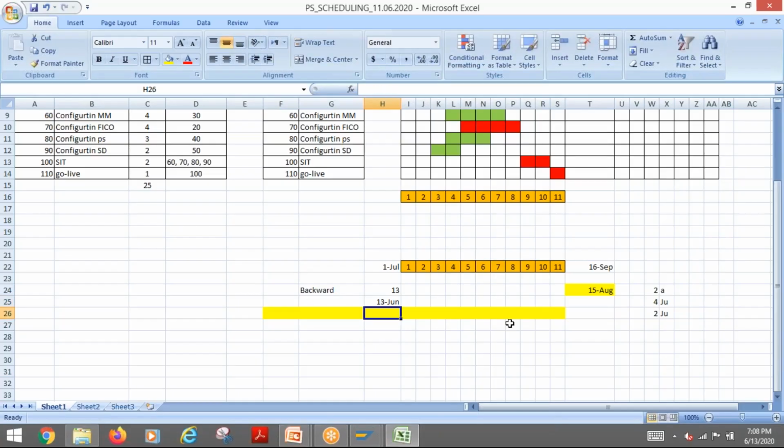It will go back if I schedule it. Agreed? Because I have a maximum of 8 weeks available, and I need 11 weeks. So it will go back 3 weeks. Got it or confused? Yeah, got it.